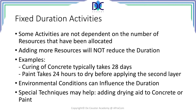The same applies to paint — it takes 24 hours to dry before you can apply the second layer. Of course, environmental conditions can influence the duration, and in some cases special techniques may help, like adding a drying aid to concrete or to paint.